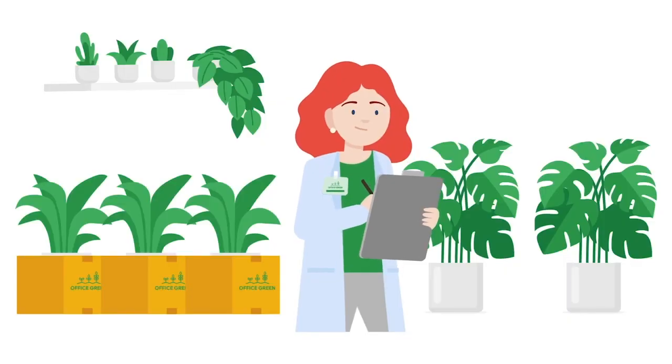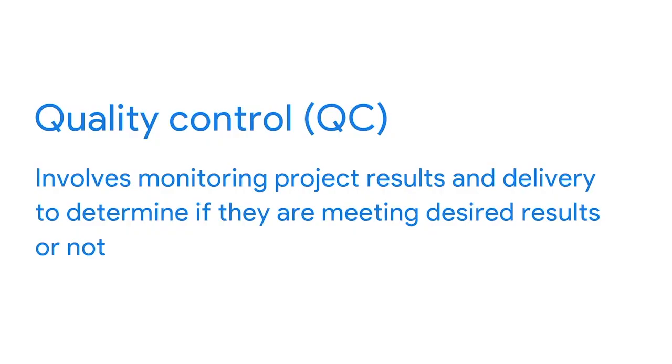The final concept of quality management is quality control, often shortened to QC. Techniques are used to ensure quality standards when a problem is identified or if the quality plan is not executed in the desired manner, and corrective actions should be taken. Quality control involves monitoring project results and delivery to determine if they're meeting desired results. If not, alternative actions should be taken. Quality control is also integral to creating a more successful landing for the next project. After the plants are placed throughout the customer's offices, quality control may look like you or a team member taking a final walkthrough, checking for broken planters or plants damaged in transit and swapping them out when necessary.